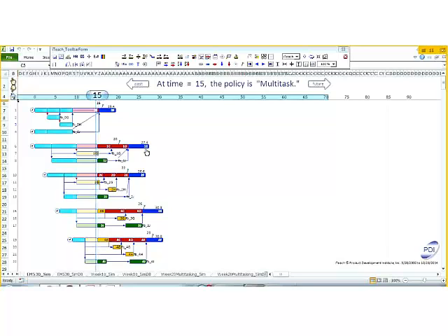So often what we'll do in a real workshop is we'll make a recommitment here, and then we'll see if the project managers can meet their new commitment. You can see that the work of the red resource is overlapping, so the red resource has to multitask across all these projects. It might take a while to get this system done, and then the difficulty is predicting when things are going to finish. So project manager 1, do you expect to get this project done at the apparent end at 27.4? Are you going to finish at your commitment?